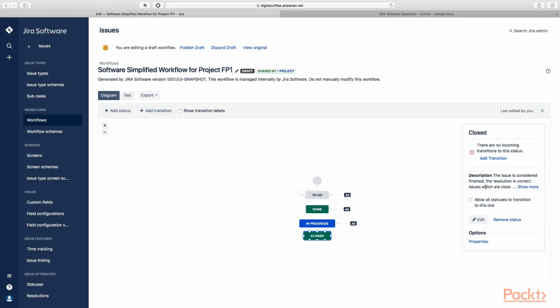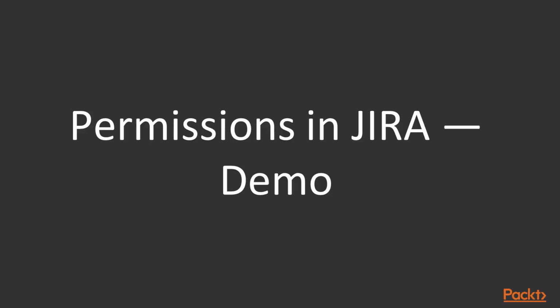One example that you might want to do would be, let's say you have story points assigned to an item or maybe hours assigned to an item. When you move that through workflow and that item goes from in progress to done, when you move it to closed, you may want to have the remaining hours update itself to 0. So that's an example of something that you might want to do. Okay? That's workflows. Next, we'll take a look at permissions.